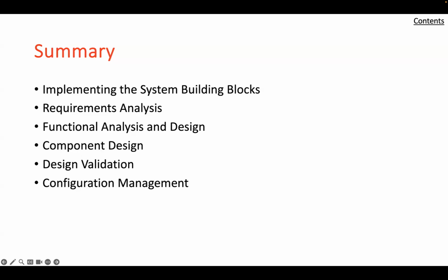Configuration management is a system engineering process that maintains continuity and integrity of system design. Configuration baselines defined in major system developments include functional baseline, allocation baseline, and production baseline. The configuration items are the system elements used to describe and formally control the system design.